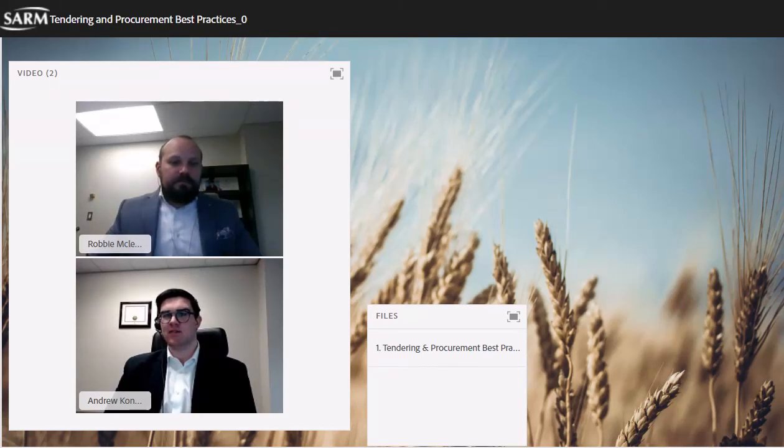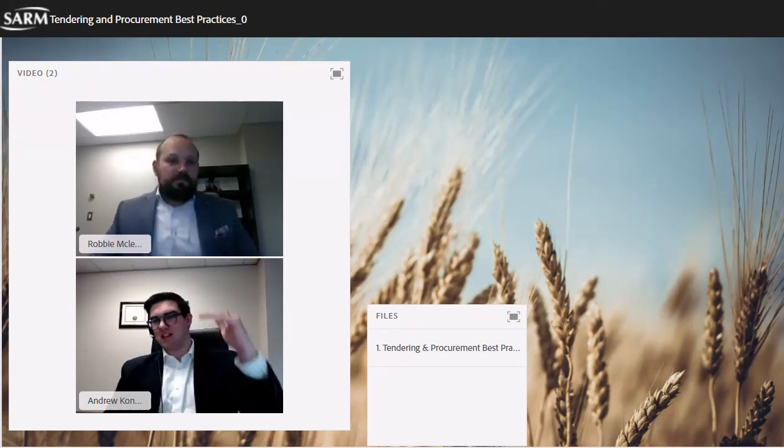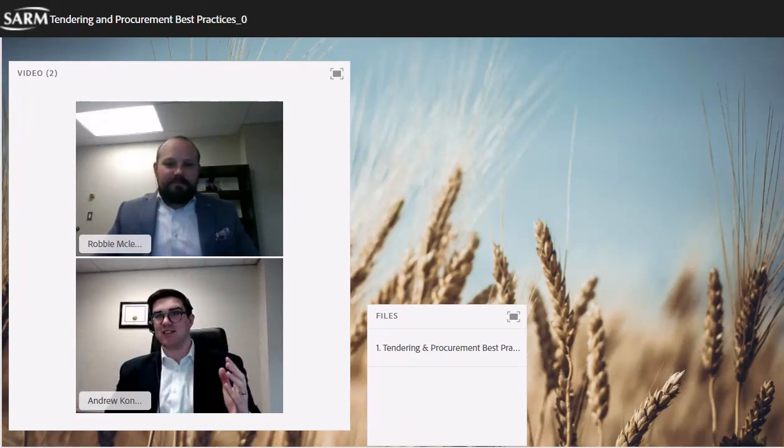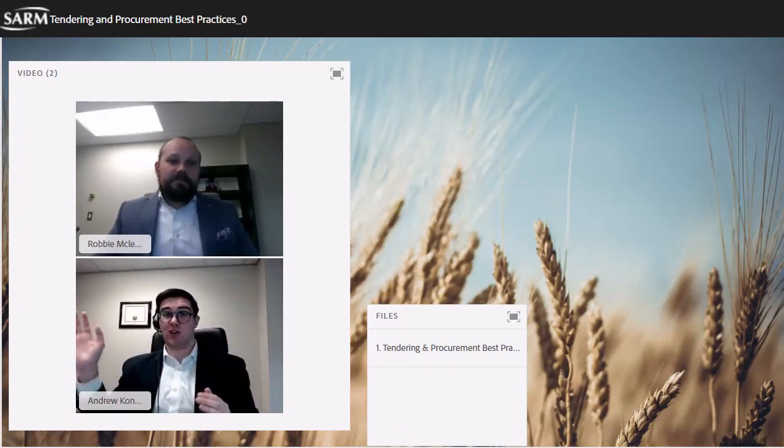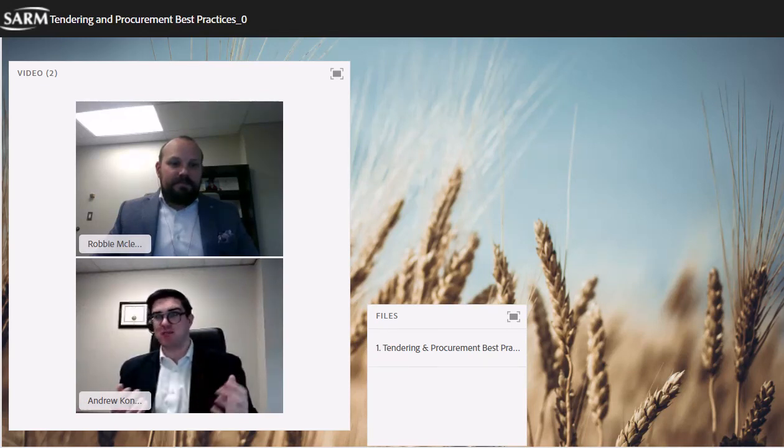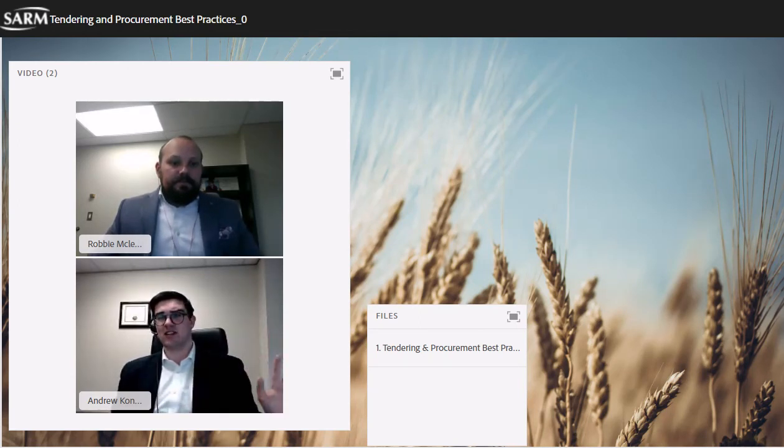Claim for lost profits. And so just think about it, your project budget is the profit, 100% plus the profit, maybe 20% of the price, to someone who's not going to do the work and has zero risk of losing. They don't have a performance risk that they might not make the full 20% if some things don't go to plan for their reasons. So, big risk if you're in a binding process. There are advantages to a binding tender process, but this is the big disadvantage and the big risk.